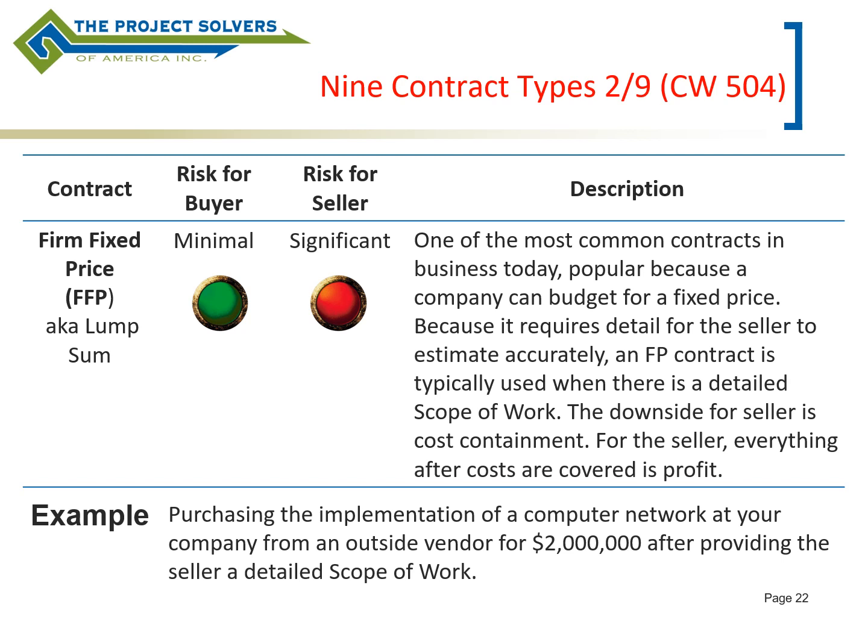So PMI would say in such a case, it's okay to use firm fixed price. But be careful, because if you are not sure exactly what the details are and you can't describe it that well, PMI would say that firm fixed price would not be the way for you to go.